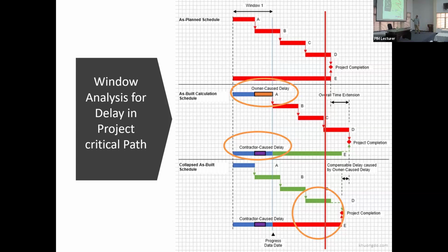Now this part here, the owner caused the delay because he didn't pay. So the project gets extended further. The plan was here, but the project got extended. Now this part, unfortunately, the owner has to pay. He delayed it.